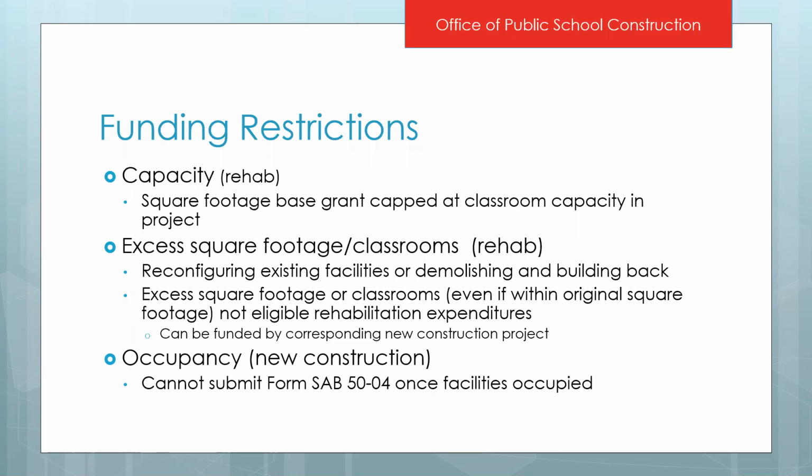If you demolish a certain amount of square footage and then you build back more square footage than what you demolished, or if you build back more classrooms than were demolished, that excess square footage and classrooms are going to be looked at as new construction because it is adding capacity to your site or it's adding square footage to your site. Those costs will need to be funded either privately because they're ineligible for rehabilitation funding, or they can be funded by a corresponding new construction project.